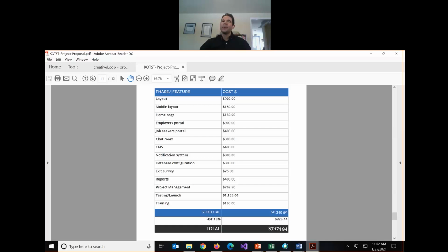So my experience is, rather than saying, I'm going to do all this work, but I'm going to charge you less, what I do is say, okay, let's look at what's essential here and what features are nice to have, like a chat bot, that maybe you don't have the budget for right now. So rather than me taking less money to do the same amount of work, I try to negotiate about scaling back the size of the project to fit their budget.